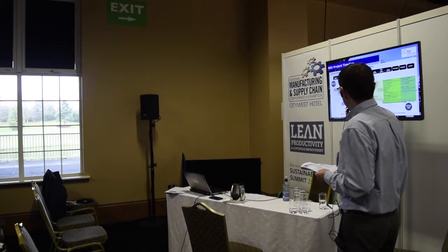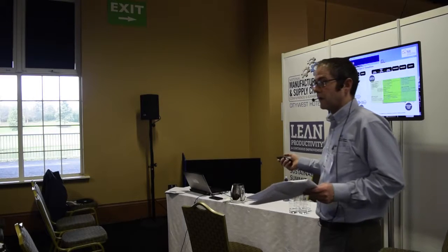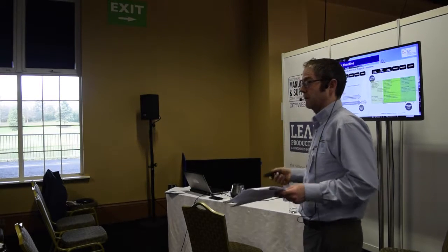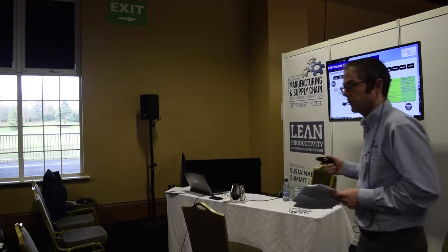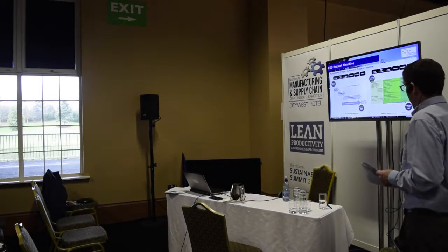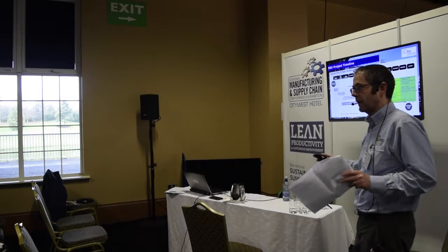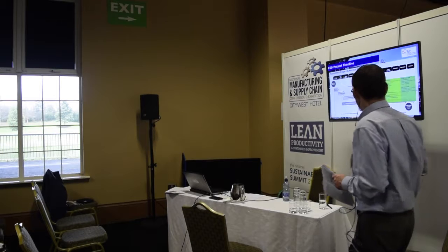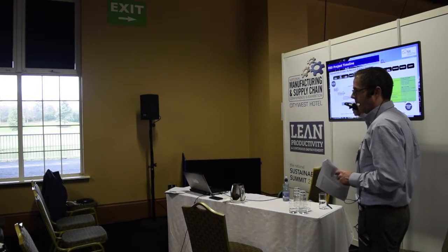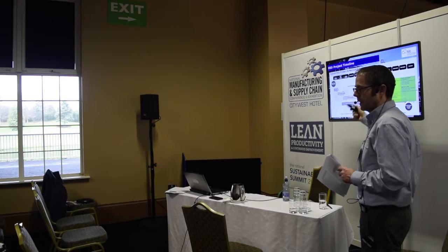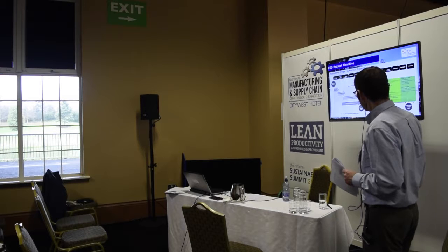So just in terms of the schedule and the timeline, another thing is, is this going to delay my project? No, because it can't. And typically it runs in parallel with the project life cycle. It wouldn't be accepted by any organisation if it was going to delay projects, and particularly fast track projects. So the EED activities run in parallel with the existing project life cycle, which is up on top there.